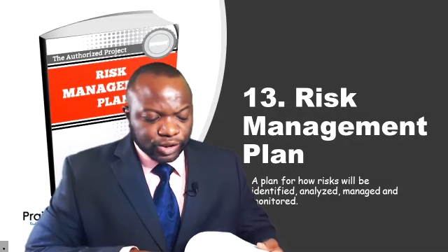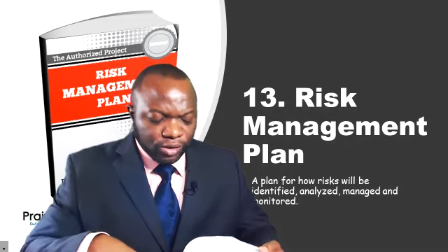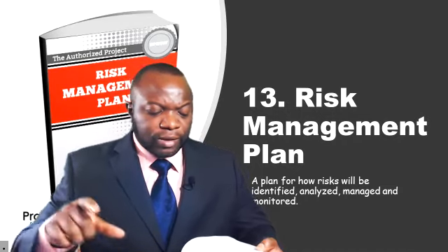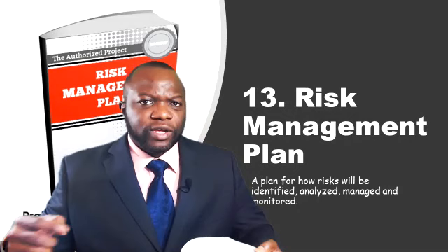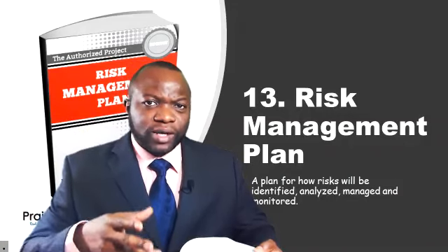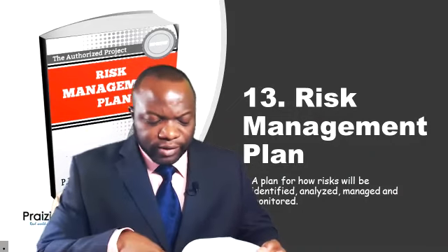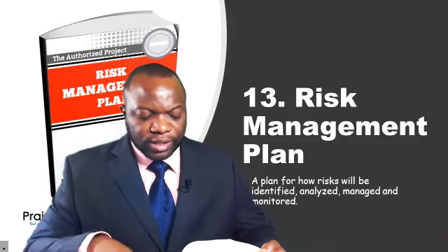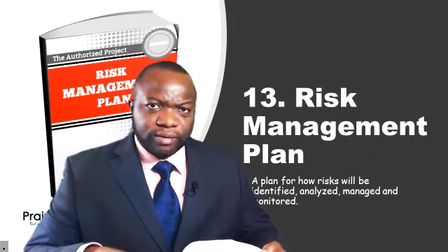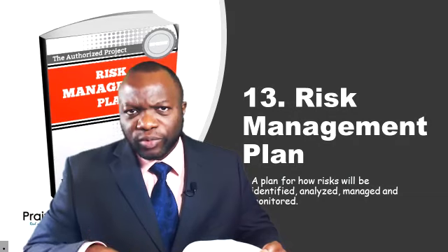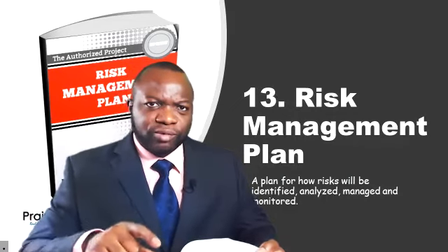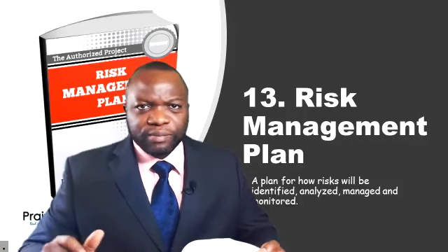The last bullet here says definitions of risk probability and impacts. This is big, and this is also a massive missing link on many projects, because a lot of project managers call a risk a 1 on a scale of 1 to 5, but they have not defined the 1 for the other stakeholders to understand what is a 1. And that's why on page 407, the example of definitions of probability and impacts is a great takeaway for every project manager that manages risks using a probability and impact matrix without definitions. We've got to define these. Some firms are awesome at doing this, but others lack what a 1, 2, 3, 4, 5, whatever the scale is, what those numbers really mean.